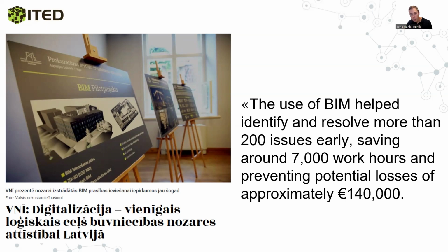But from the client's own words that they later put in the public press, the use of BIM helped identify and resolve more than 200 issues early, saving around 7,000 work hours and preventing potential losses of approximately 140,000 euros. So that's an ROI of 250%.